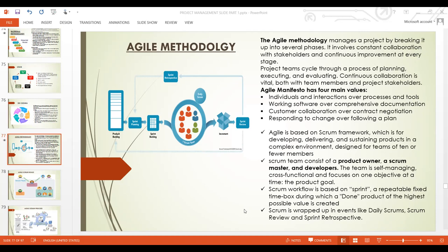Daily Scrum is a meeting that is held every day in a Scrum environment when you are managing a project using Scrum. It's a must that every day you have a meeting with your team where everybody will itemize what they did yesterday, what they are planning to do today, and the challenges they are having. So by the time every member of the team comes to table what they've done, their challenges and what they're planning to do, it becomes very clear what is going on.